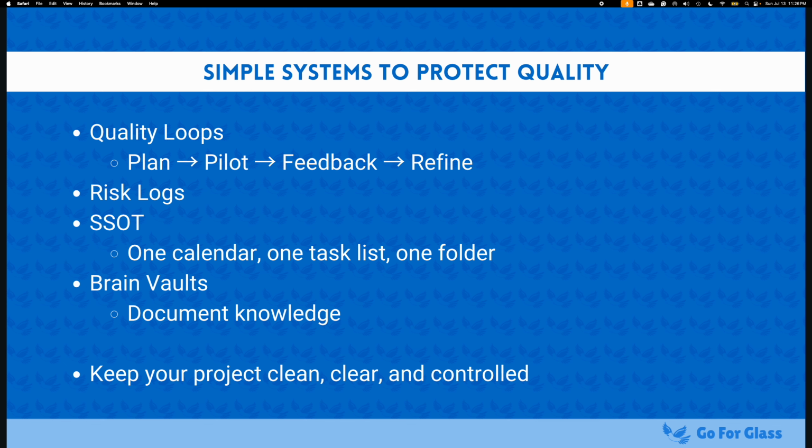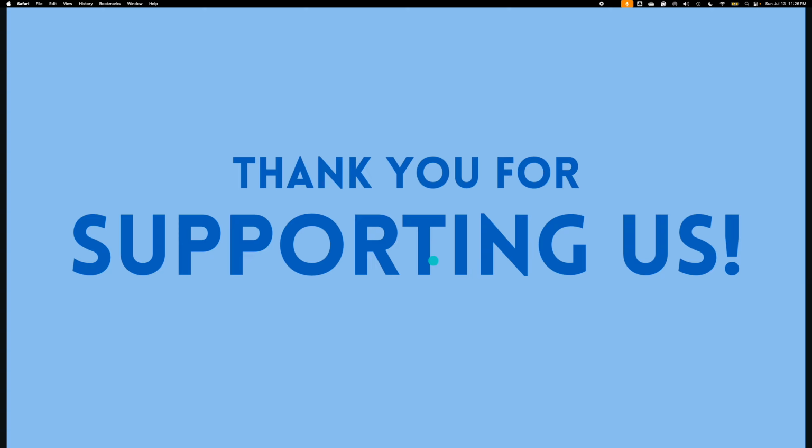If there's one thing I had to add, just off the top of my head, that wasn't in this project, it would probably be mission creep. Mission creep is inevitable. It's a fact of life. Your team members, your advisors, your feedback groups, or even likely you are going to suggest here, let's add just this one more thing to the task list at every phase. As a result, the only way to prepare for this is to add a margin of error. And you're going to add a 10% margin minimum to the following.